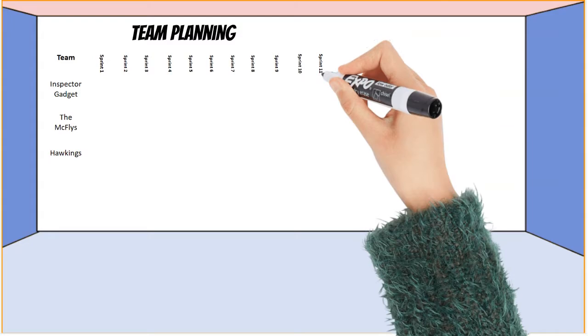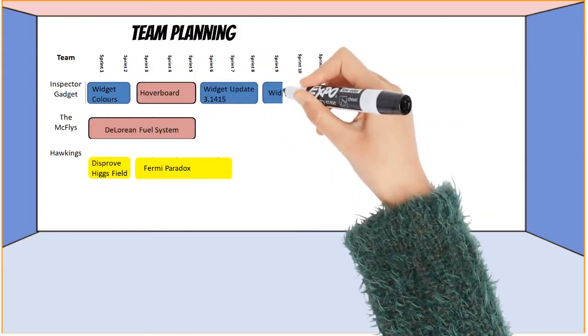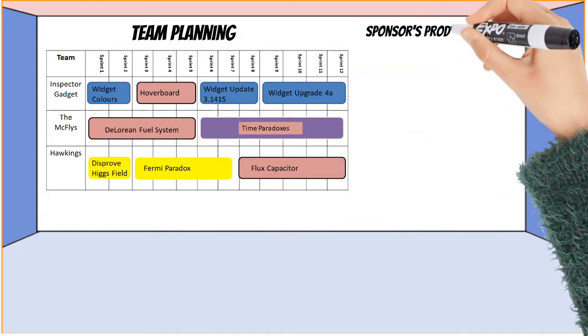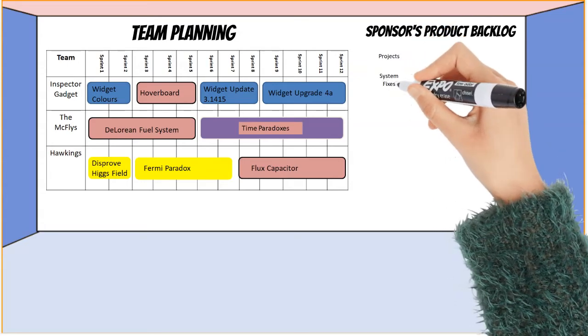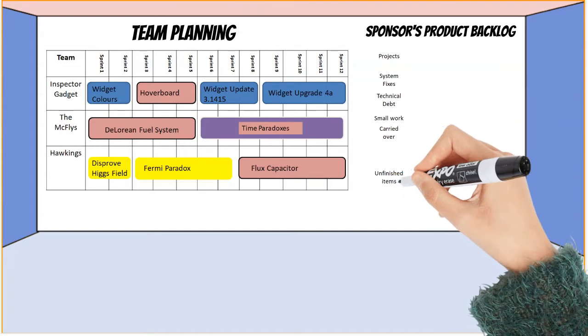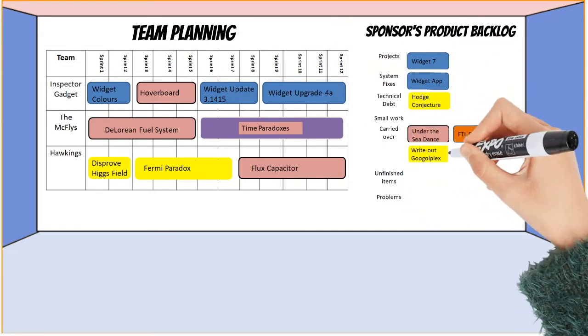This iteration at a glance is a great tool to see the scope of the work being considered, the effort and pace needed to deliver, and to look at how optimistic or aggressive the timings are. Aggressive timelines carry more delivery risk, while a conservative paced approach with a well-defined MVP lowers that risk. A set of contingency tasks can be included on an availability capacity basis and so can be slotted in if time allows.